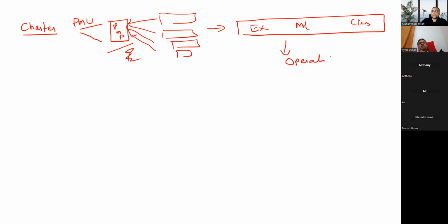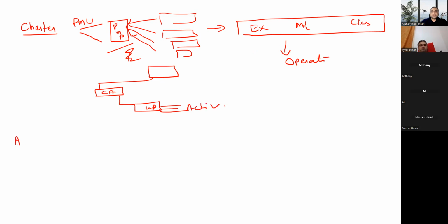and you will deliver the project to operations. And here we do the work in the form of scope baseline, which is like this: level 1 the project name, level 2 the control account, and level 3 the work package. And if it is going in the work breakdown structure and WBS dictionary, so we have what? Activities related to that. If you are going in agile, in agile we have a vision statement, that is, what vision we are trying to achieve.